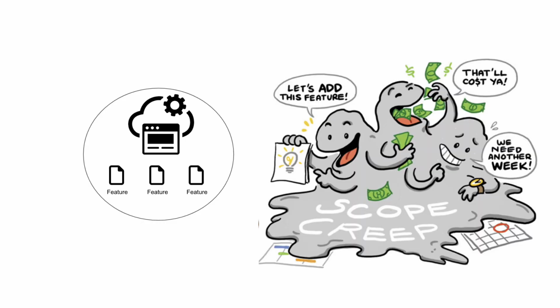There is also one more term you're going to face, which is scope creep. Scope creep is a situation when the initial project scope got extended compared to initial goals. For example, you agreed to build a one-page landing page with a product catalog, and then the scope changed and now you have to build a shopping cart and connect a payment module so users can add products in the shopping cart and pay via credit card.